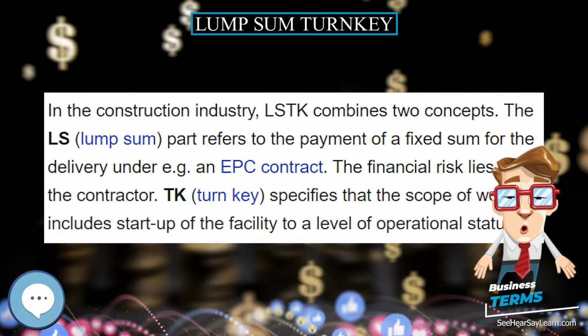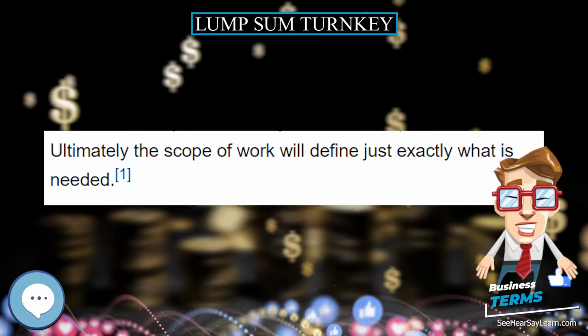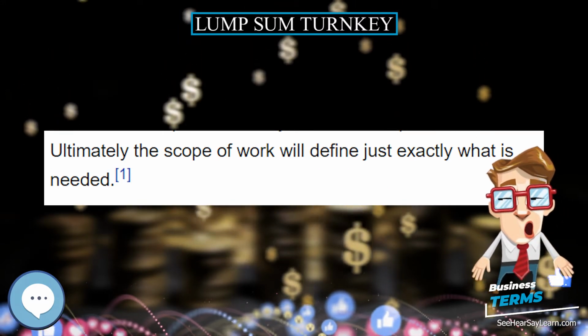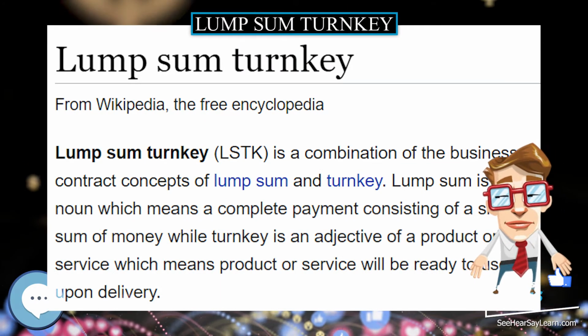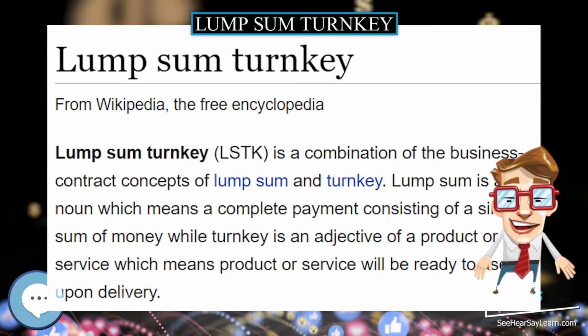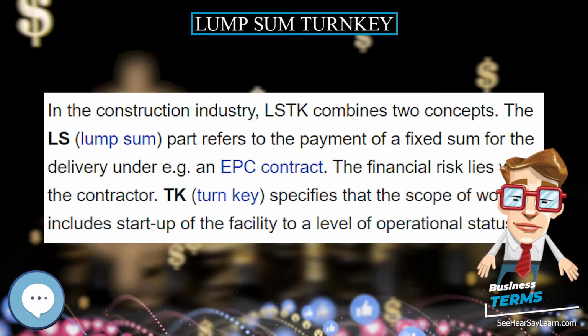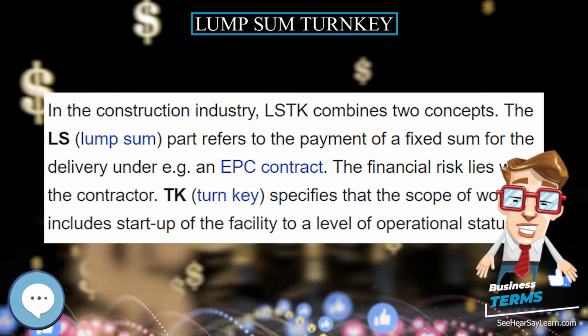In the construction industry, LSTK combines two concepts. The LS, lump sum, part refers to the payment of a fixed sum for the delivery under, for example, an EPC contract. The financial risk lies with the contractor.